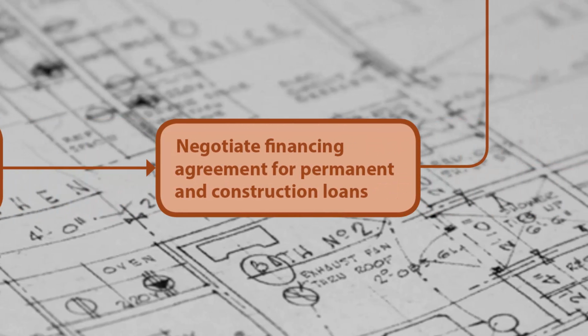This can be a delicate stage, especially for projects with complex financing plans involving multiple layers of conventional and public funding. The developer will need to navigate overlapping and sometimes contradictory starting expectations from different funders and ensure that discrepancies are resolved. Because most funders do not lock in certain financial terms, especially interest rates, until the very last minute, small shifts in the broader financial markets can require last-minute adjustments to the deal, and in extreme cases can lead to a project's failure to proceed.